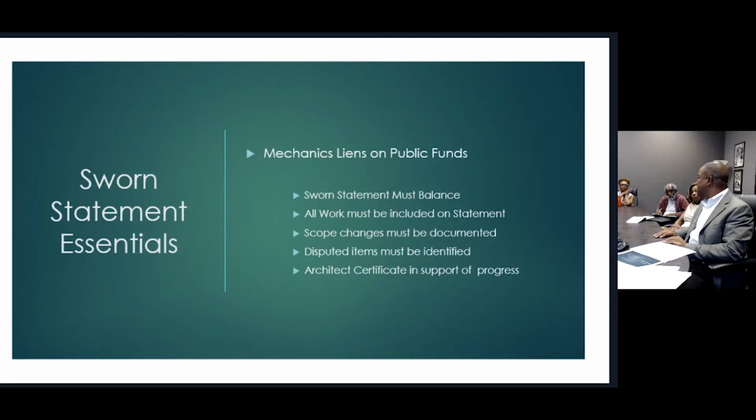You don't want to mess up and have your numbers off, because when you have your numbers off, at least from my standpoint as an old administrator, if I see one number off, I think the whole report's wrong, right? So your credibility rests on how you can add. Okay. All work must be included on the statement. Again, you can't later on add work that wasn't on the initial statements.